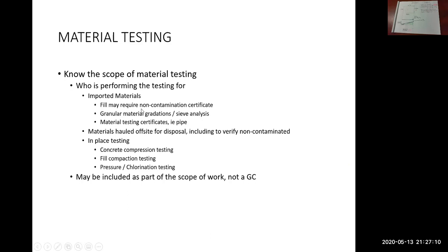So this doesn't really apply to quality control testing, to material testing. This is a different type of test to confirm that material being supplied to the site is not contaminated. Typically, the gravel suppliers will provide you with that certificate.